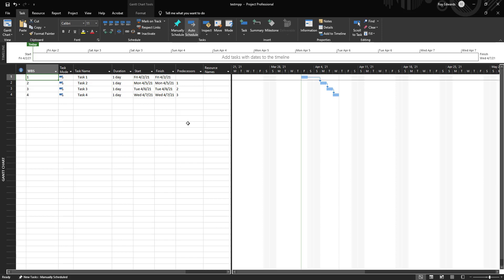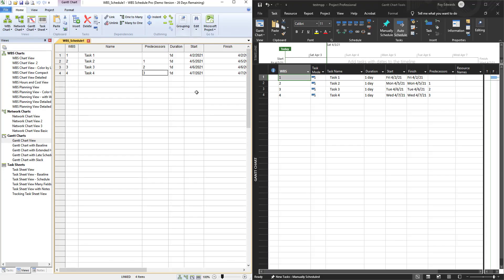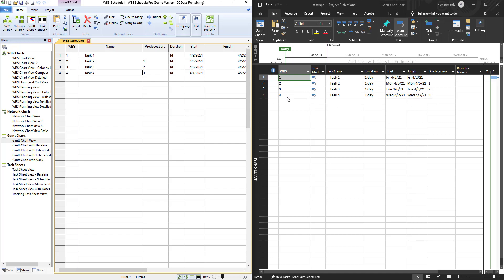I'm going to simply do a split screen now to show you how these two projects match up. Here on the left side we have WBS Schedule Pro that has tasks one through four with WBS one through four. Here on the right we have Microsoft Project showing us the same data. WBS one through four, they are tasks, task names one through four. They carry a duration of one day. They have the same start and end dates and they have the same predecessors.